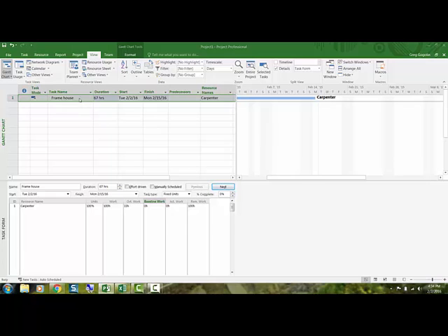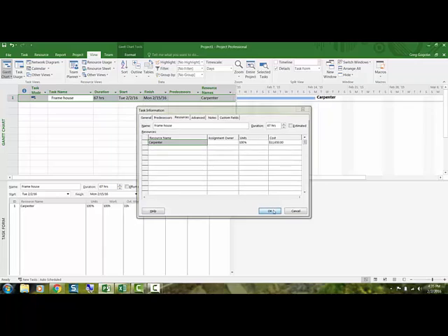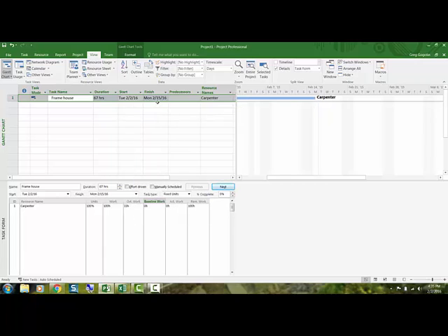I can double click and I can see that that task is $11,650, which means that the overtime cost me $1,650 more than what I was paying, but I'm done on the 15th instead of on the 19th.